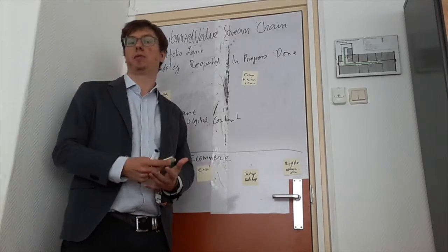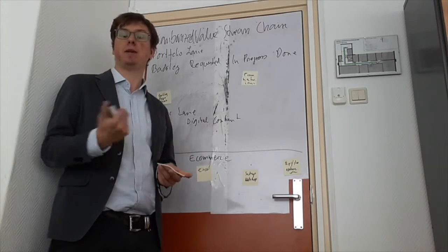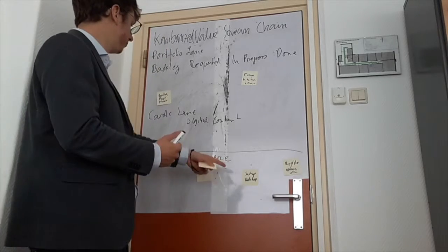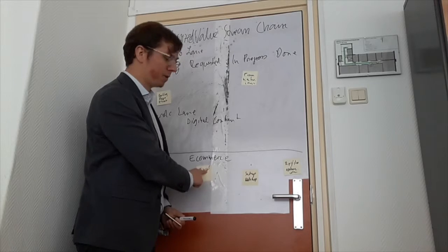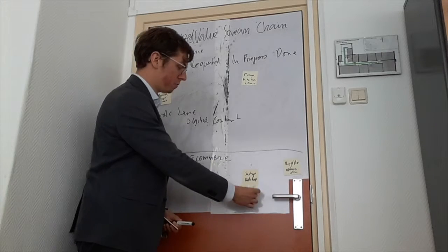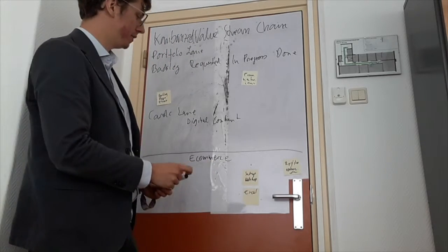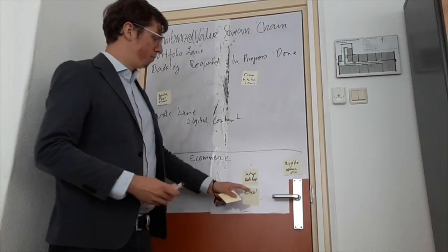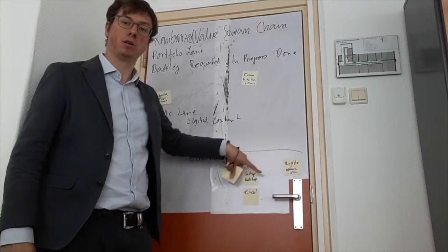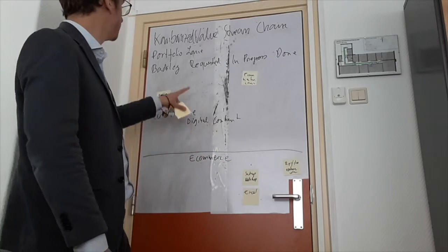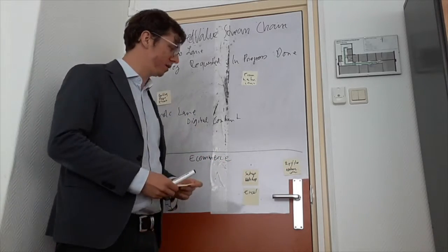And this is called dependency management between different cards. So, for example, this card is currently blocked by this card, so the boss is in progress with this, but the designer cannot start with this until this is actually done. So he has to look, what else can I work on?